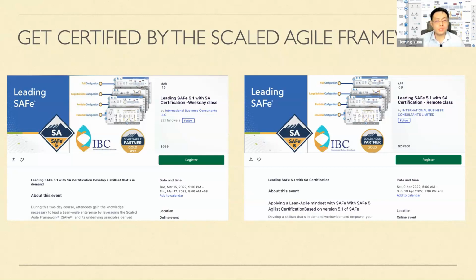Then you know that, okay, on average is around 30. On the high side, maybe around 45 story points. On the low side, around 18 story points, for example. So depending on the capacity, how many people are working, and looking at past data, how many story points the team completes, and you load the team not at 100%, at 85%, 80 to 85%.